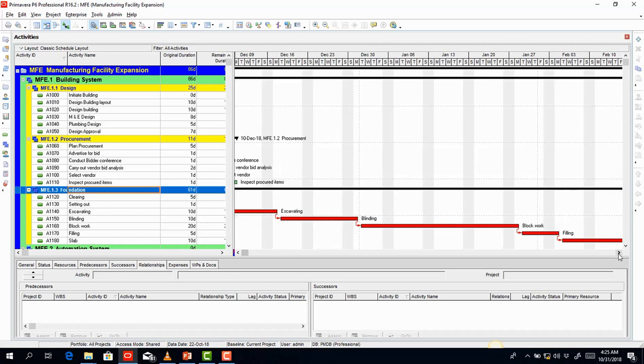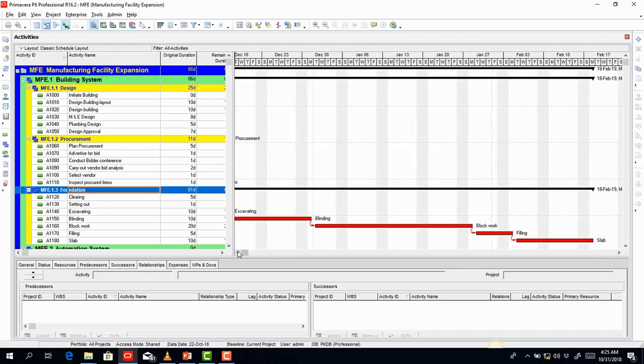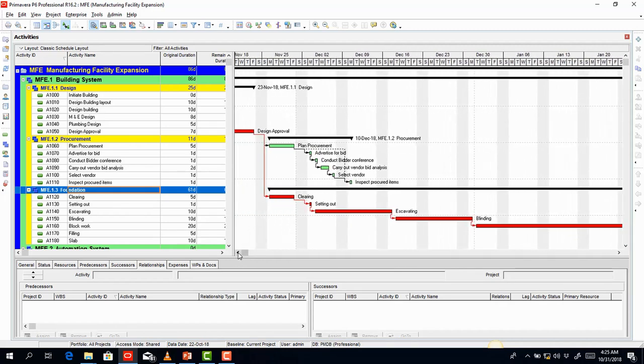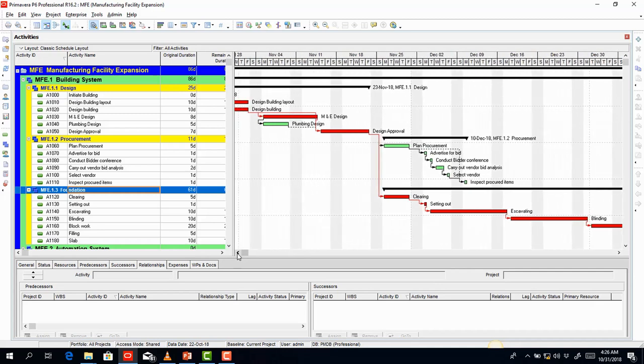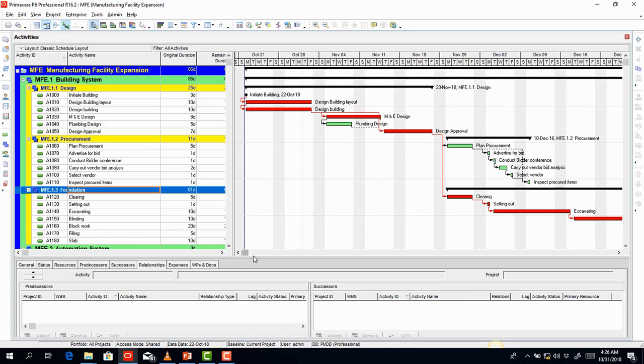That's essentially what the critical path helps us to do. So it means that for these activities on the critical path, let's ensure we do not delay them, because they are the ones that determine the project duration. And if you delay any activity on the critical path, you would inadvertently affect the project duration. Another exciting part here is you notice some of these activities are in green.